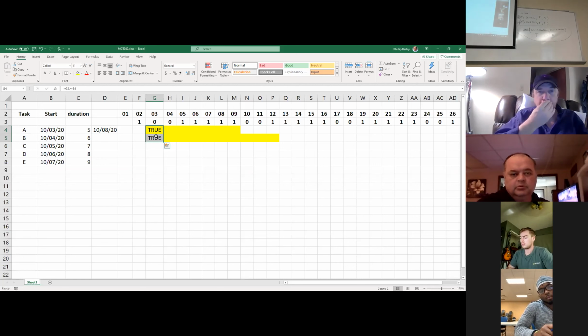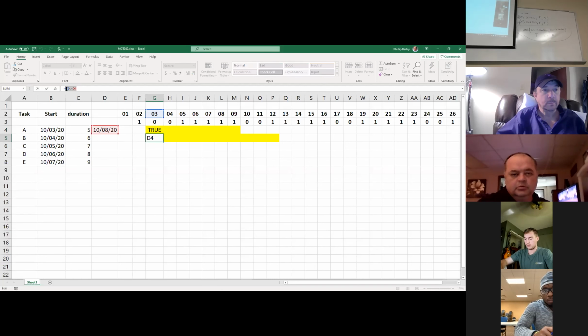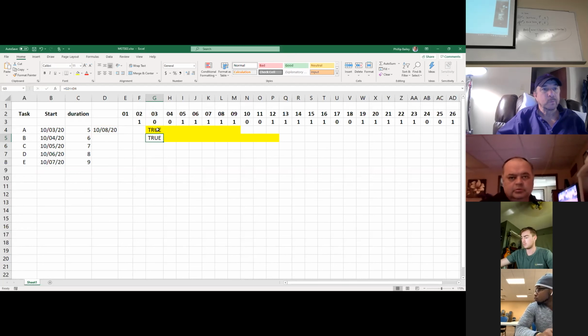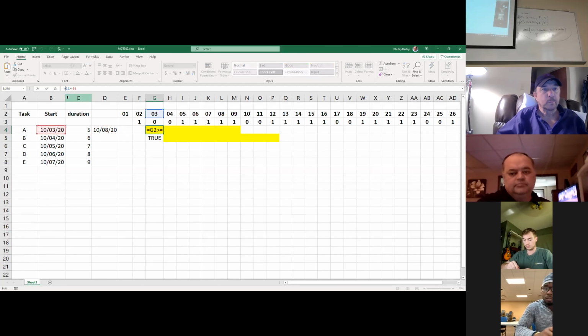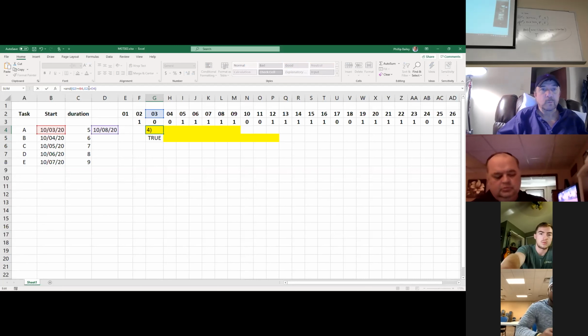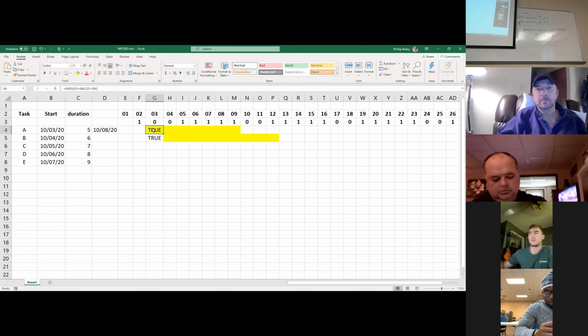So now we can come up. This is where it can get easy for you. We go through and go, okay, I'm here. I'm going to copy this one. That's a test. Copy. Up here, and we'll put an and statement in. A, parenthesis, out to the back side of it, comma. Put in the next one. Paste it in, Control V, close paren, and enter. And it now says that that date, the 3rd, is between the 3rd and the 8th.